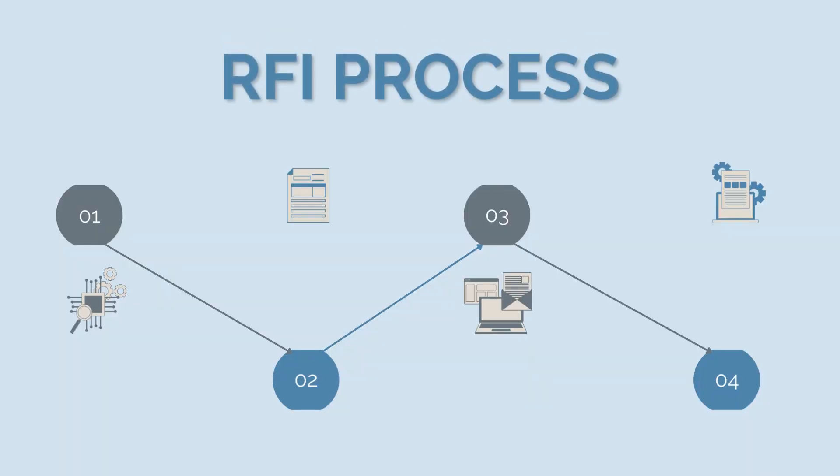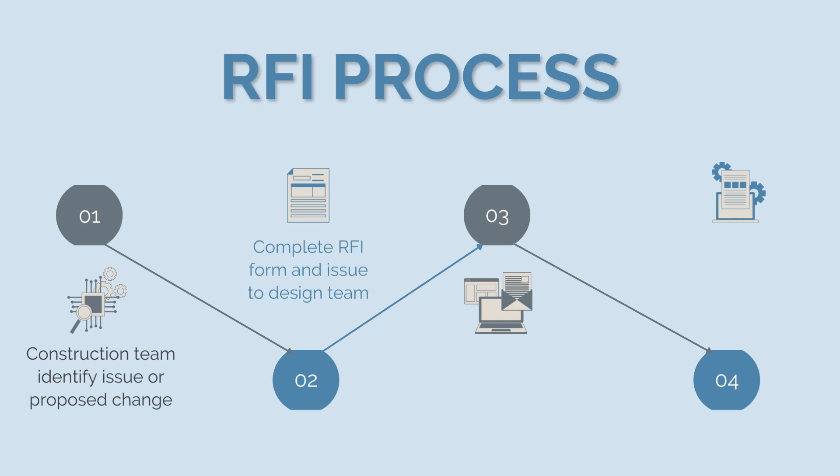The RFI process is relatively straightforward. It begins with the construction team identifying an issue or proposed change. They then complete the RFI form and send it to the design team. Usually it goes to the design manager first, who will then decide which designer to allocate the RFI to. The designer team will then prepare a response and issue it back to the construction team.